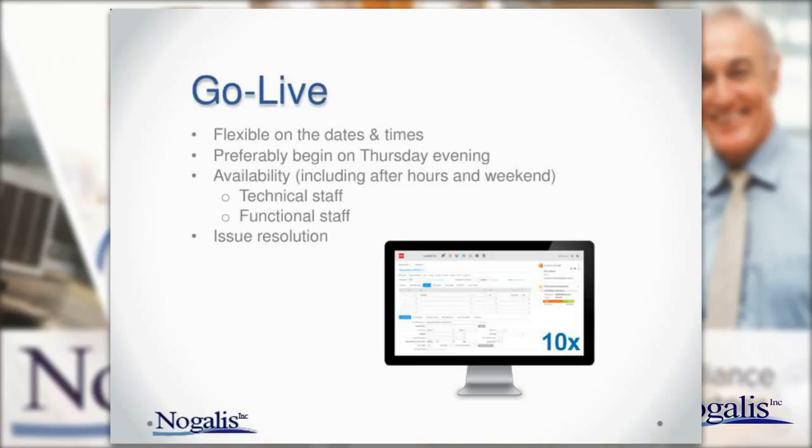One thing that we did learn is you're going to have the ACA tables. There's no upgrade program for the ACA tables. So if you've applied all the ACA patches in version 9 and you've got data in there, you're going to have to apply all the same ACA patches in version 10 and copy that data over. And Desi, you just did that for a customer. Do you want to tell us a little bit more about that process?